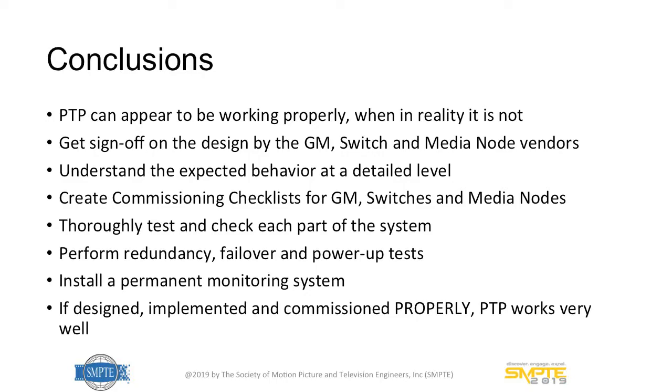Make sure you're doing your redundancy, failover, and power-up tests, so you understand how it should work. Go through that experiment of fail the grandmaster, fail the antenna, fail the link. Make sure that in all the different combinations, your system is behaving as you expect. Make sure to have that permanent monitoring system configured, installed, and running. And lastly, if you design, implement, and commission it properly, PTP systems work very well.